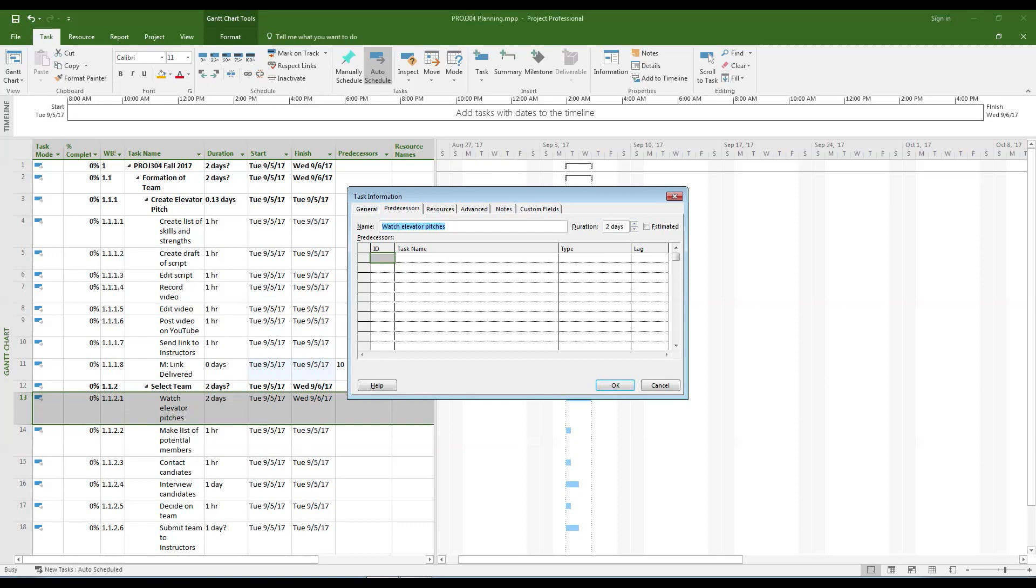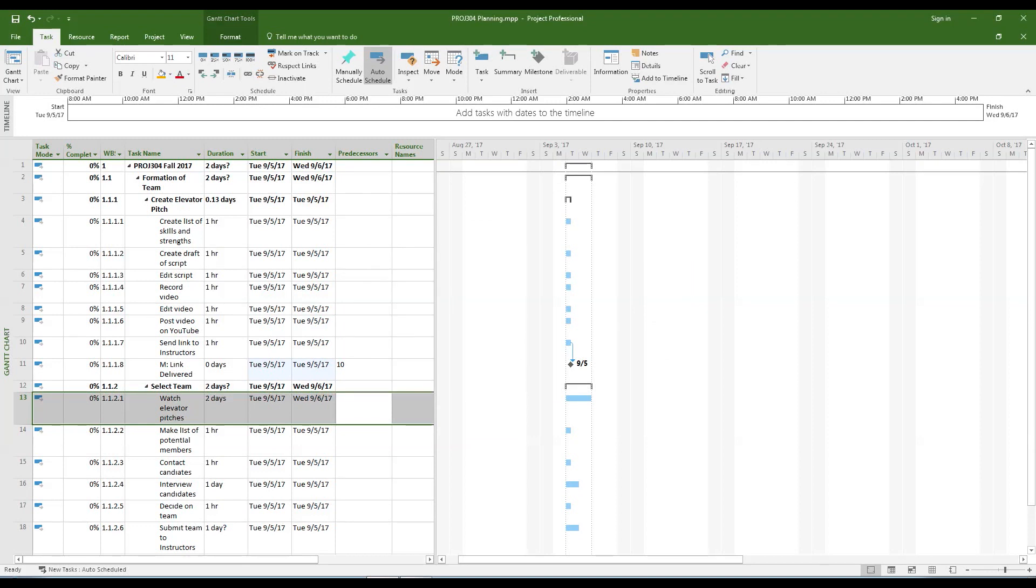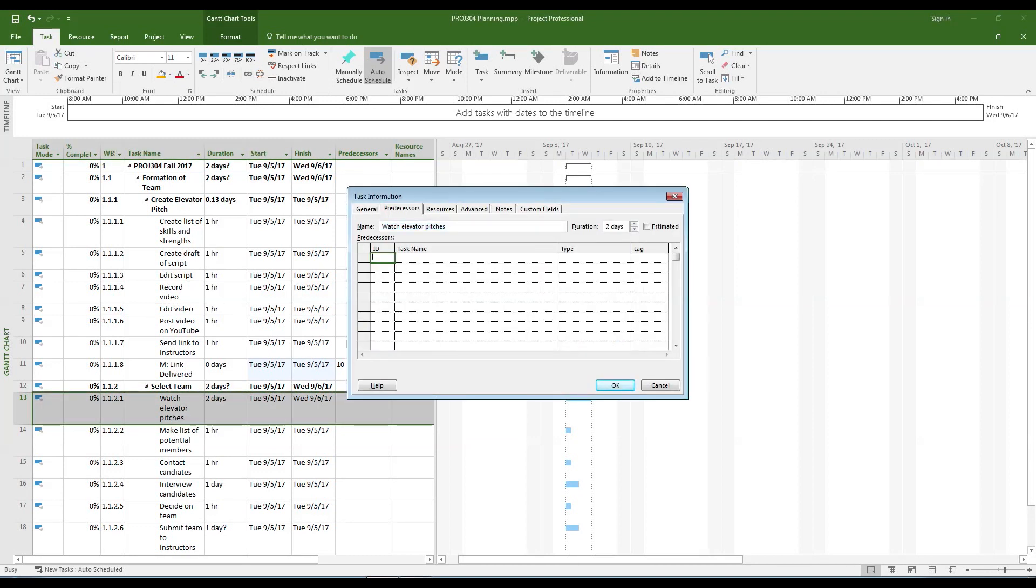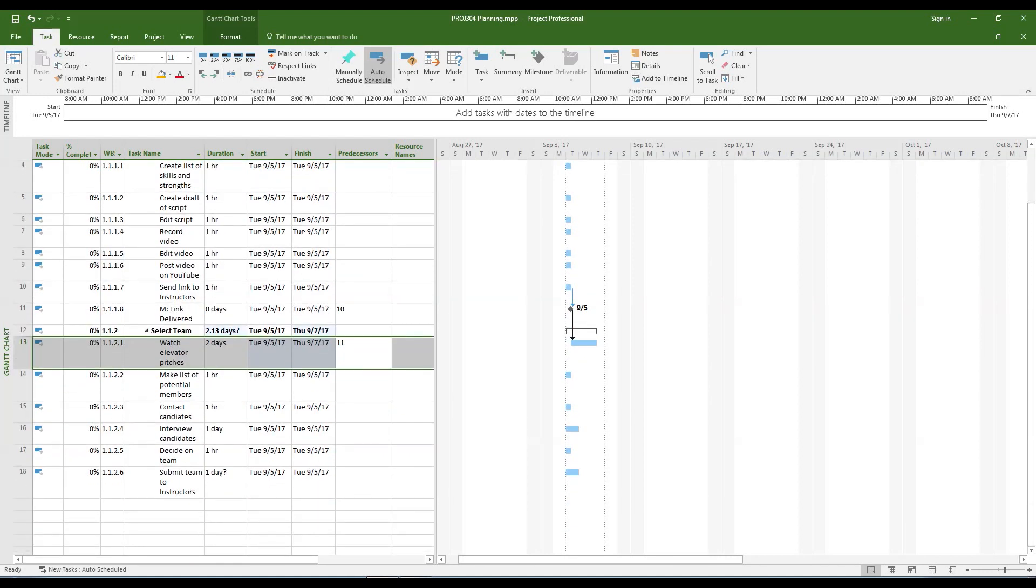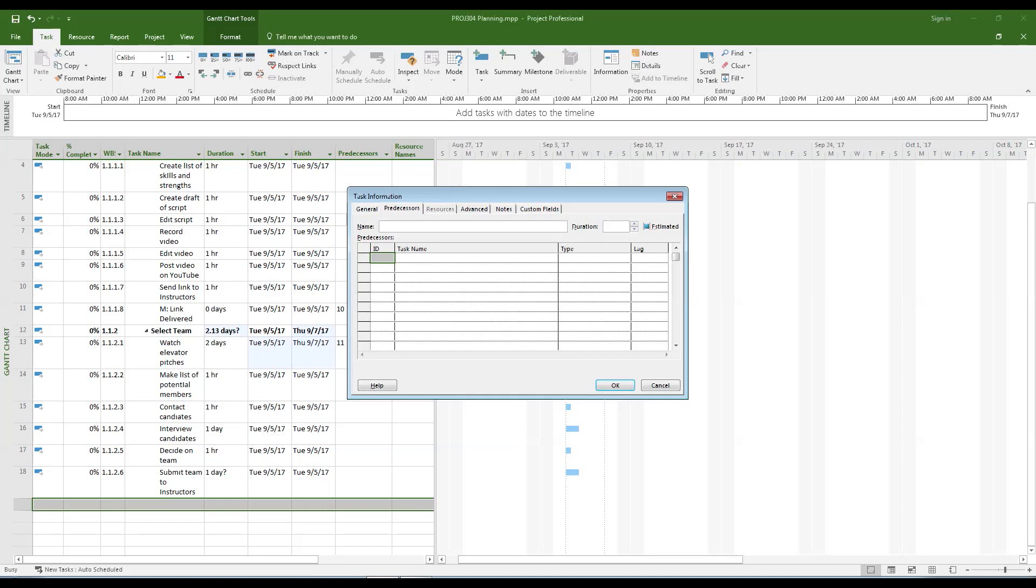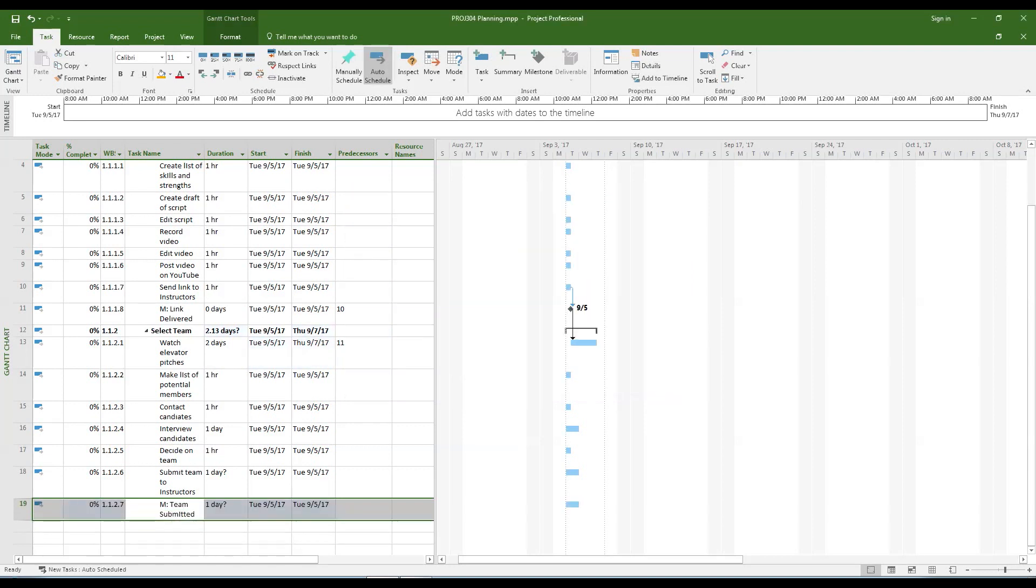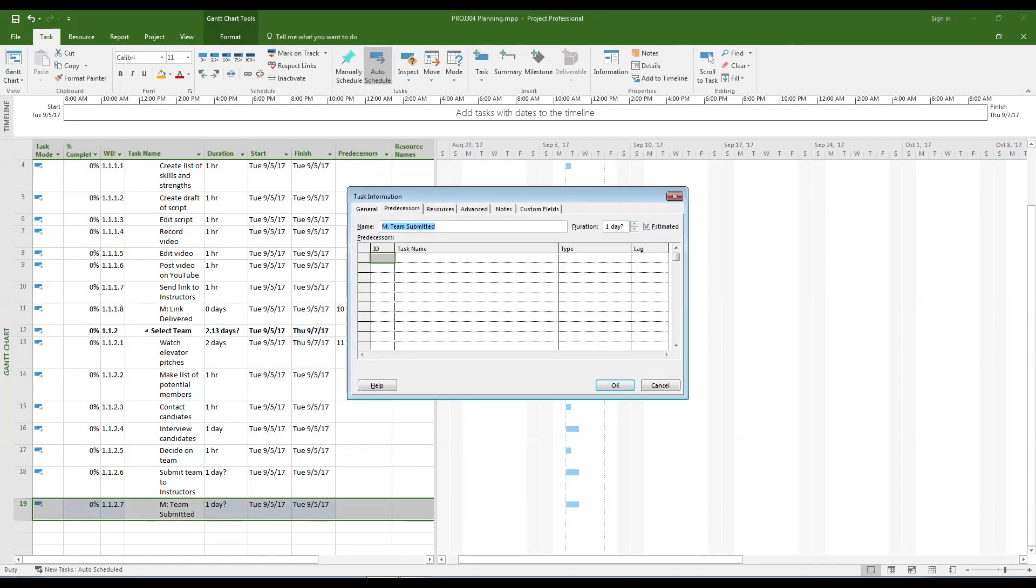The first subtask of the next phase of the project will most likely be dependent on the previous phases milestone being complete. Finish entering all of the dependencies in the Predecessors column. Remember to ask yourself if a task is truly dependent on another task being finished before it can be started. There are often times when multiple tasks can be worked on simultaneously.